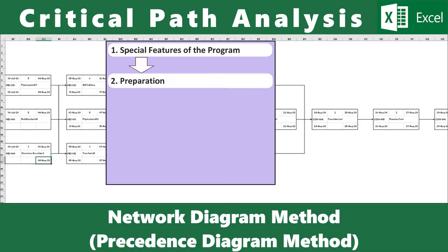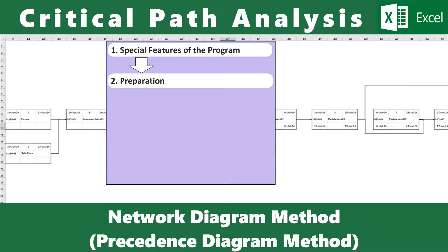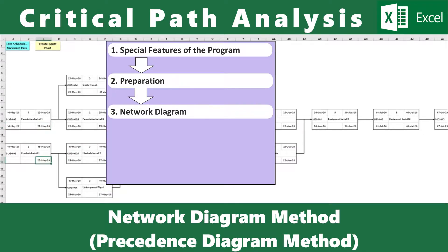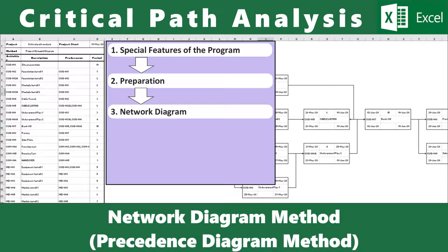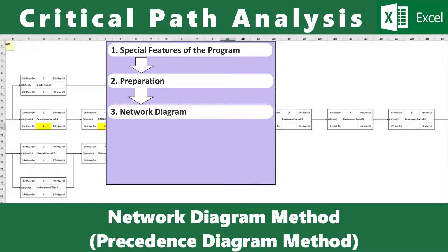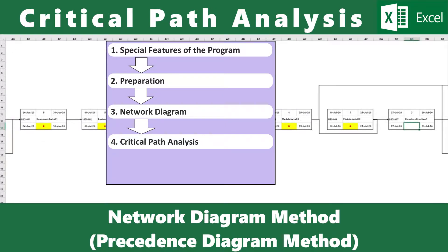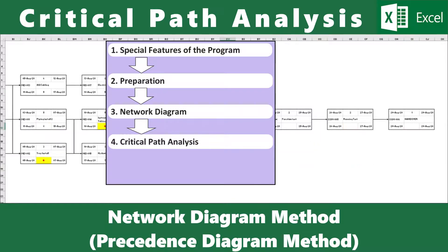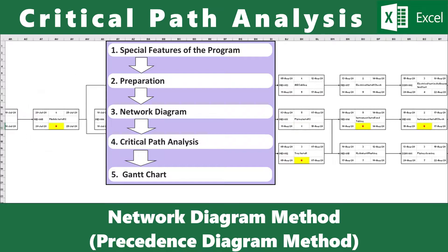Second, preparation works such as essential worksheets and preliminary activity schedule data. Third, create an initial network diagram to review and finalize schedule data by modifying the network diagram. Fourth, perform critical path analysis using the network method along the forward and backward pass. Lastly, generate a Gantt chart based on the final network diagram.